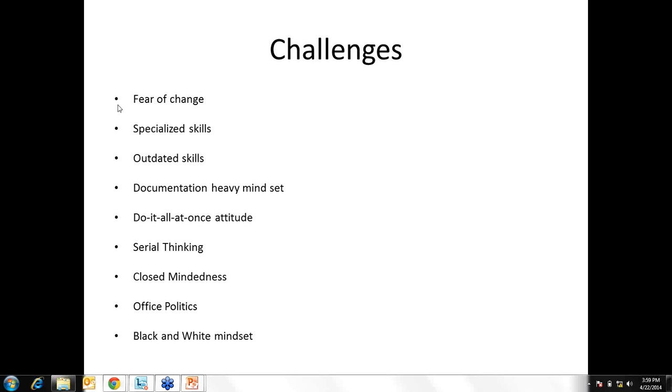How will we plan for testing, as we may not be knowing the release date? In Agile, you do not have to wait till the end of the software development. Rather, in each of the iterations, both the development and QA testing teams have to work together. As and when they complete one requirement, they do an internal release, which should be tested by the QA team. Finally, within the iteration, they have to plan so that before the end of the iteration there is time for a final release and for defect fixes.